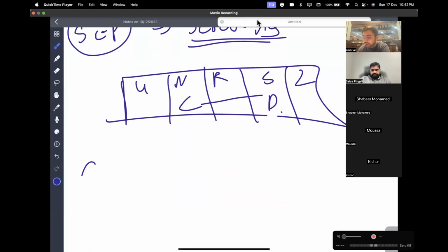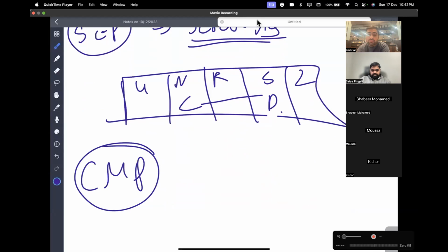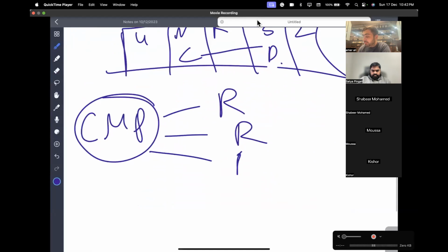And then in the meantime, we start making the communication management plan. The communication management plan consists of the 5 Rs of communication: the right information that we want to communicate at the right time to the right people to have the right impact. Who needs the information? What information is needed? In which format is it needed? Do we need push communication? Do we need pull communication?